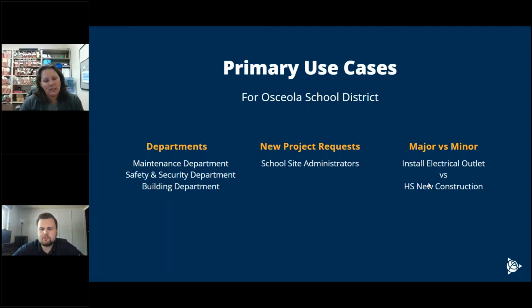Like I said earlier, some of the processes are just for tracking. For example, we have what's called a forms review process. This is when a construction manager has maybe a change order or a contingency. They will start the forms review process and upload their change order along with all their documents. Once they submit it, it goes to the PM to review the change order.